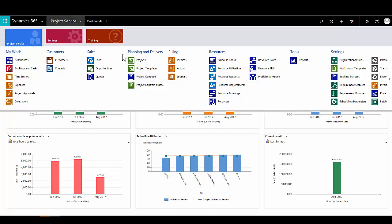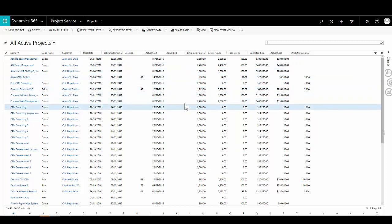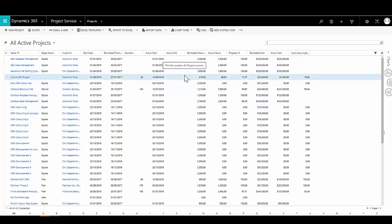Central to tracking and managing projects is the project record. Here we can see a list of all currently active projects within the organisation with key information: the name, the current stage — whether it's a new project, in quoting, planning, or actively being delivered — the customer, and key information on estimated start and end dates, actuals, budget, and actual time and money spent.